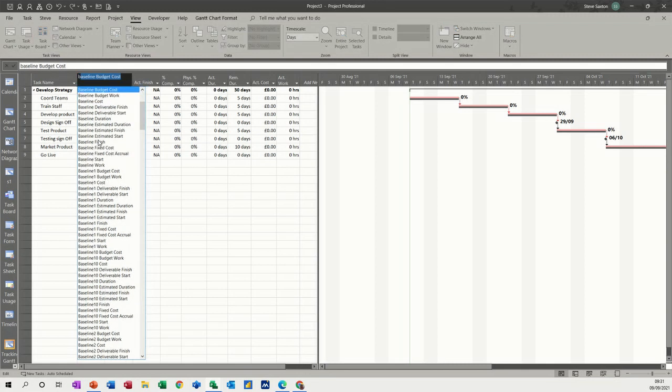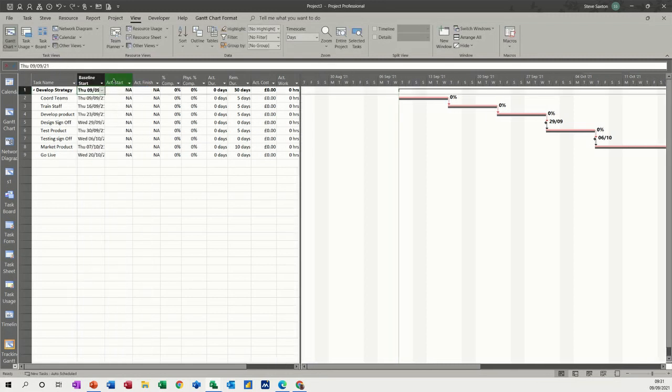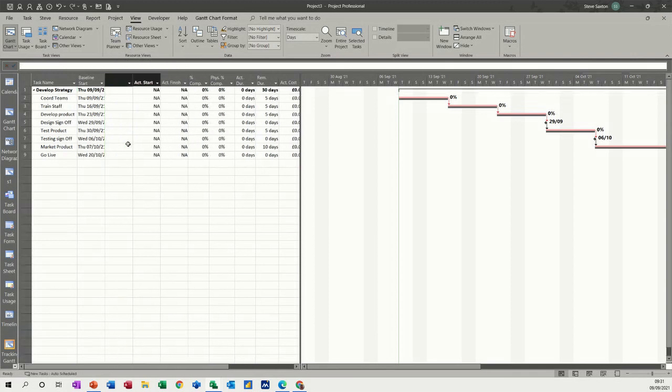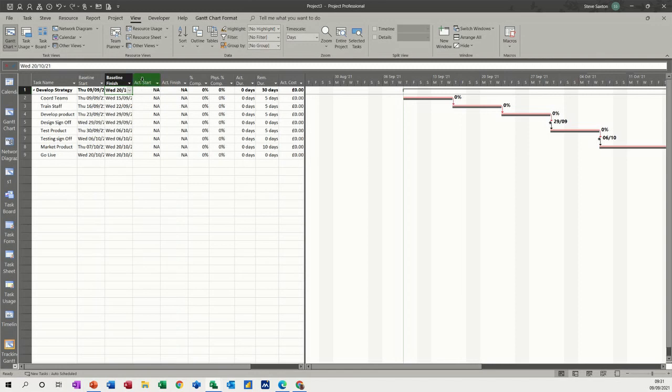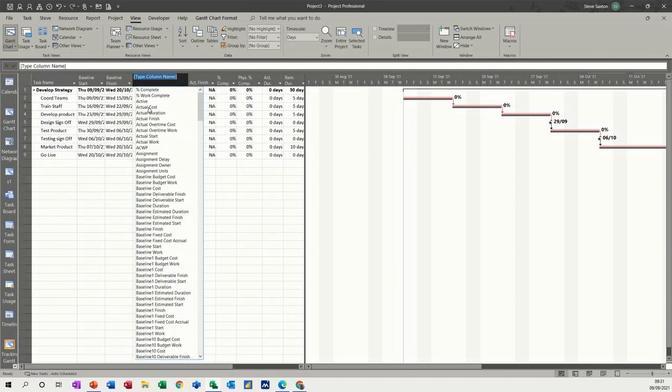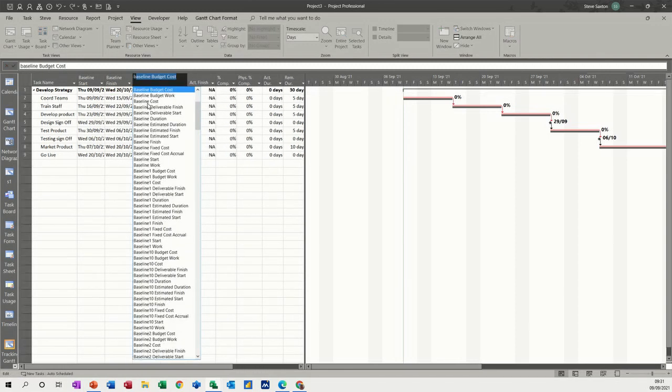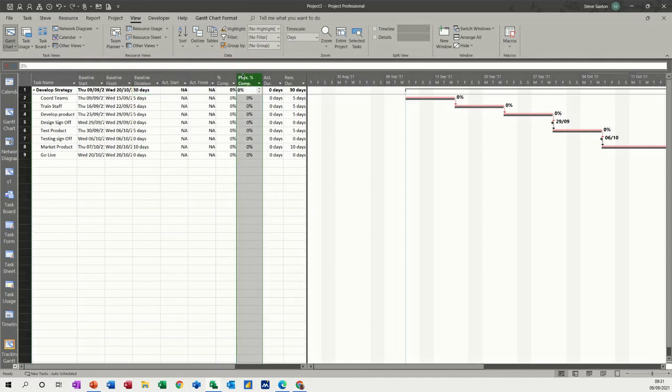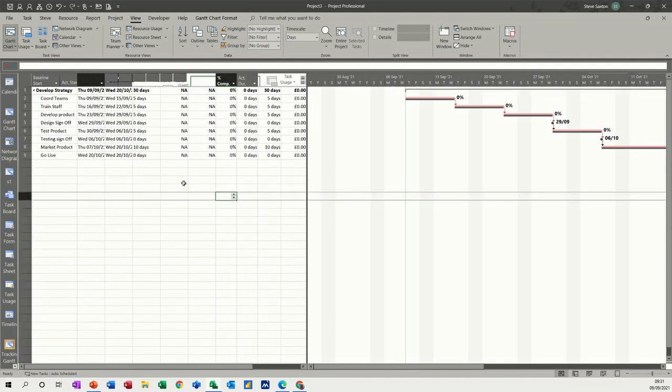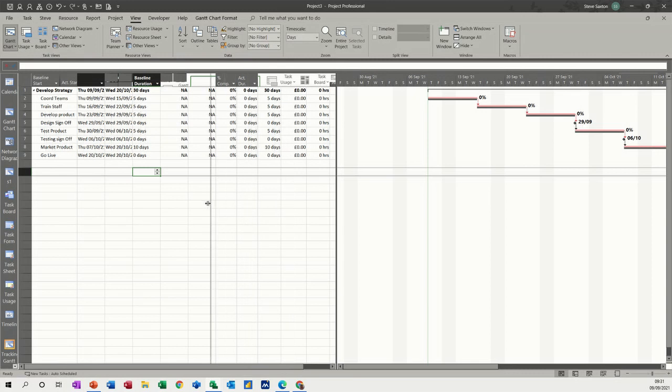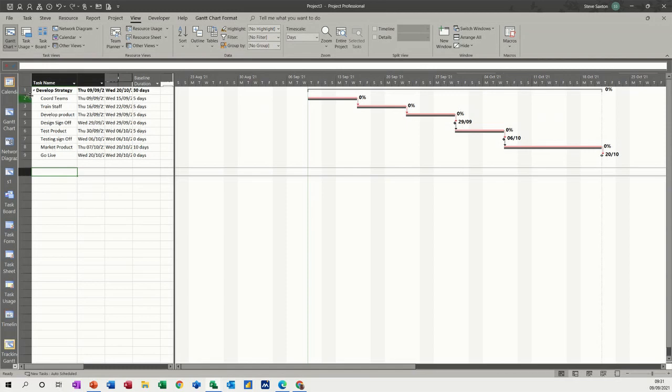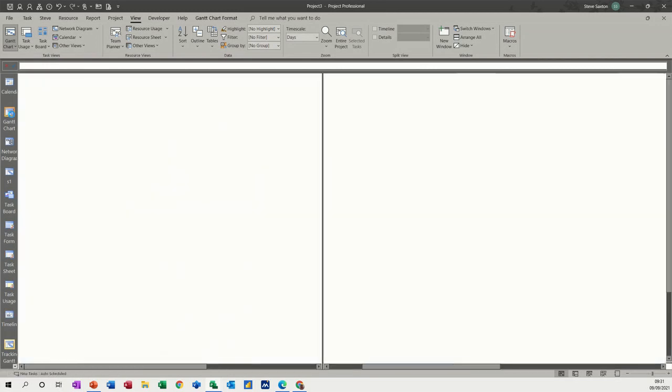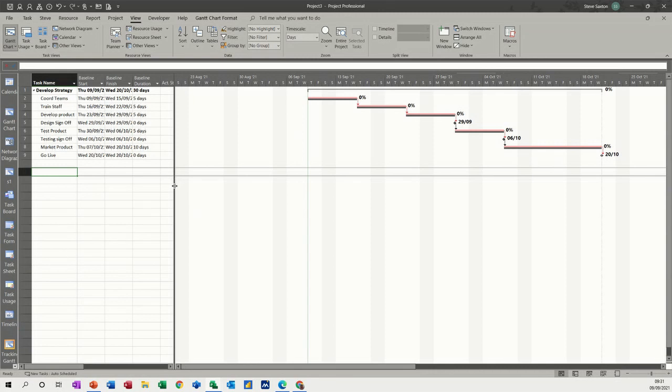I normally edit this too because you can't see the actual start date there. Insert a column - baseline start. Another one - insert column baseline finish. And then baseline duration. You've got an idea of when things are supposed to start. I don't really want this column, so I'll just get rid of that, hiding it.